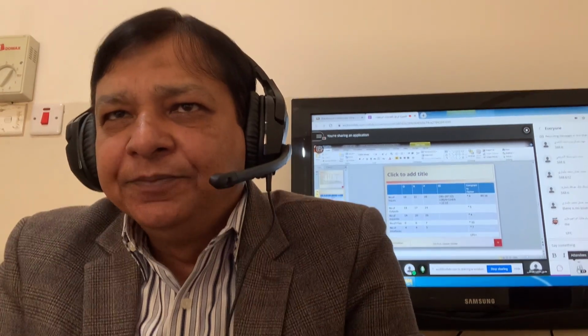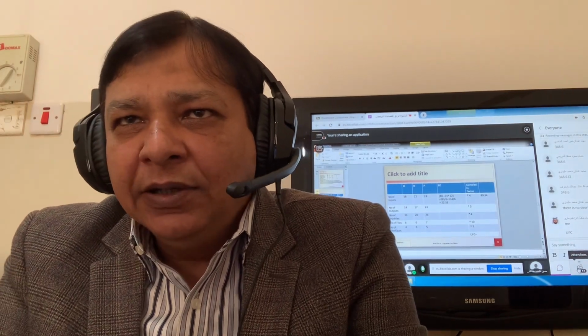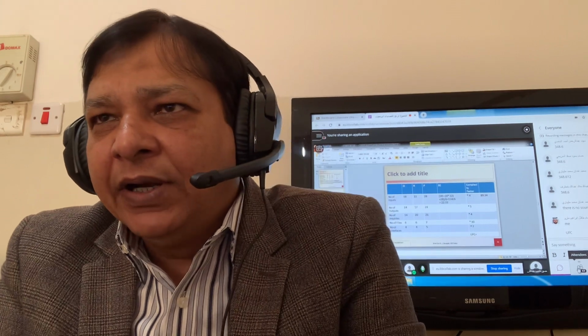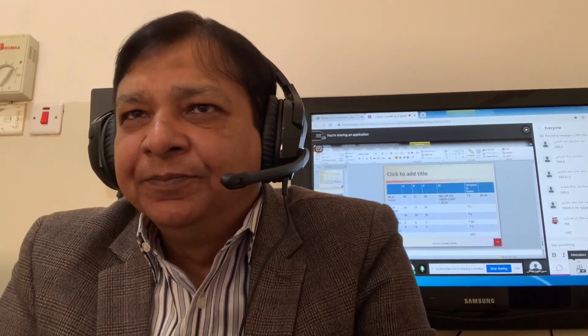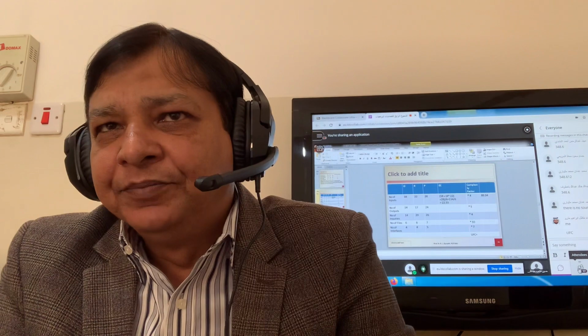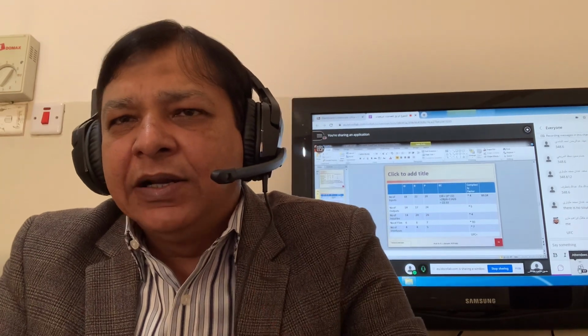From these 5 parameters, you will calculate EC, and realistic is the most average count, so you give it a weightage of 4. So O plus 4 into R plus P divided by 6, you will calculate EC, the estimated count. Now you know whether your project is simple, average, or high complexity. For this case study, it's average complexity. Complexity factors are given for inputs, outputs, inquiries, files, and interfaces. So we multiply EC with the complexity factor. You have 5 values, and the summation of the 5 values is equal to the unadjusted function count.